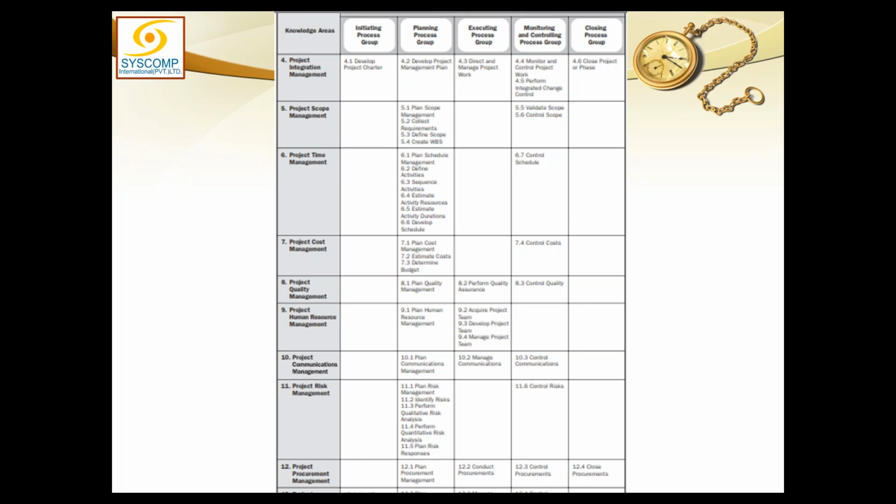He looks around and sees who all are the stakeholders, so that he knows who he will be consulting with while he is planning. These two steps are enough to initiate the project. First is the development of the project charter, and then is the identification of stakeholders.